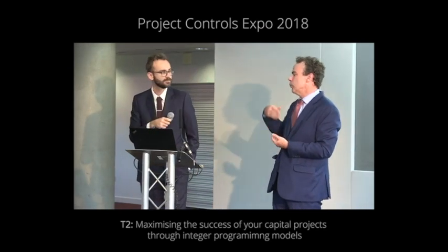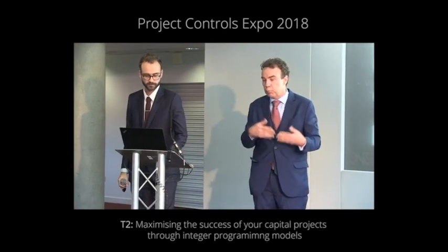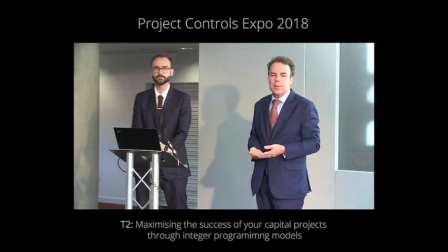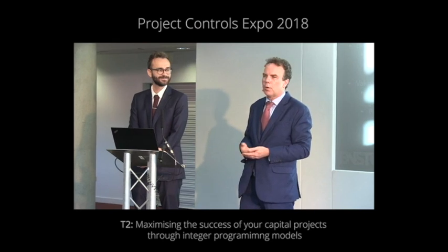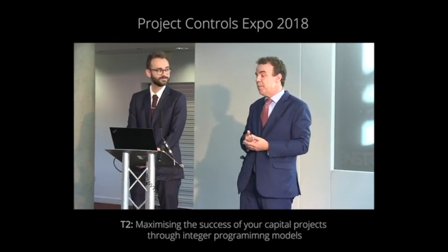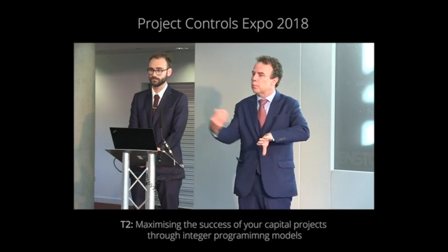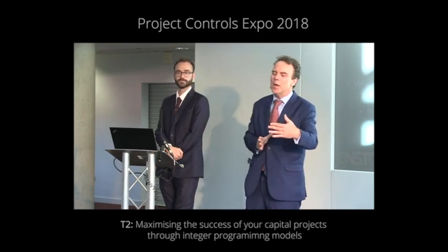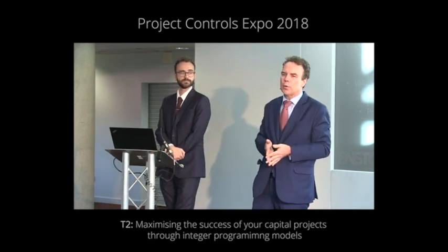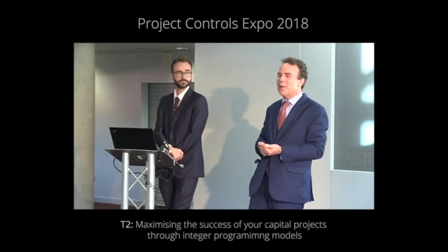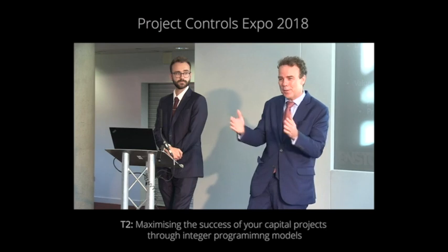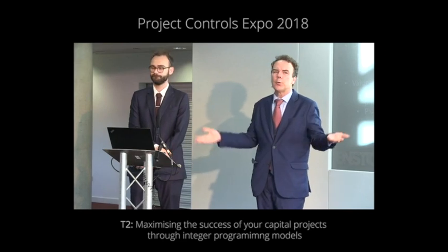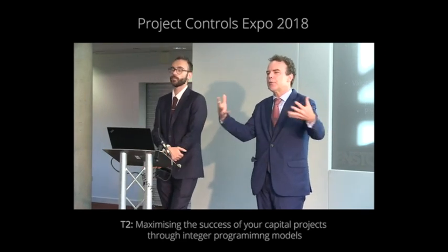And a final point, when we're looking at risks and how they affect project performance and how that affects the overall cost of the project and eventually the business case of the asset, it may be that a project that you greenlighted last year that's not going so well, or some risks have been realized and others identified, it may be the best thing for the organization to put that on hold or kill it for more favorable projects that have come along. So we don't just make the assumption when we run our model, and it's typically not the case, of course, that any ongoing projects are a given. They have a big leg up on new projects because you've already made that investment and you have a smaller way to go to realize that value of the project. But if there are issues, those actually get pulled into our model as well. So we are looking at ongoing and potential new projects together.